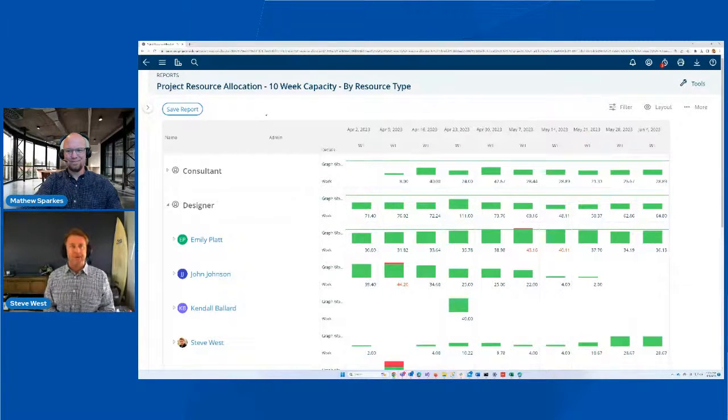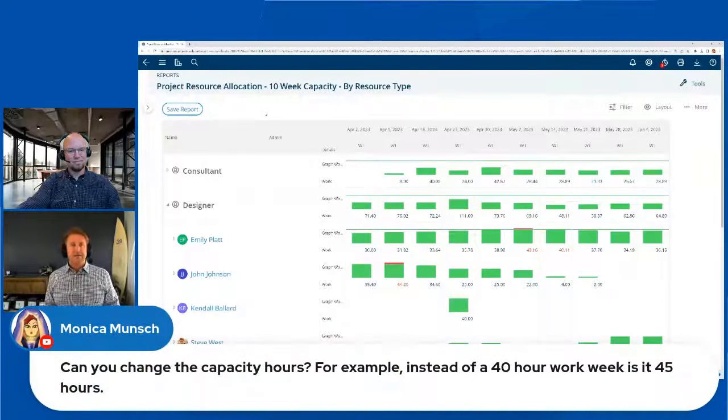You can use the top-down project to show that, to say for this quarter, we think that so-and-so has this much capacity for this much time. So that's a way that you can basically plot out that you would put in a project, say, managing help desk. You put your 10 people that manage a help desk on there and say, well, this person's 10 hours a week, this person's 20 hours a week, this person's 30 hours a week. And that's how you can block that time off. And then you use the bottom up for your regular project planning that you're doing on top of that.